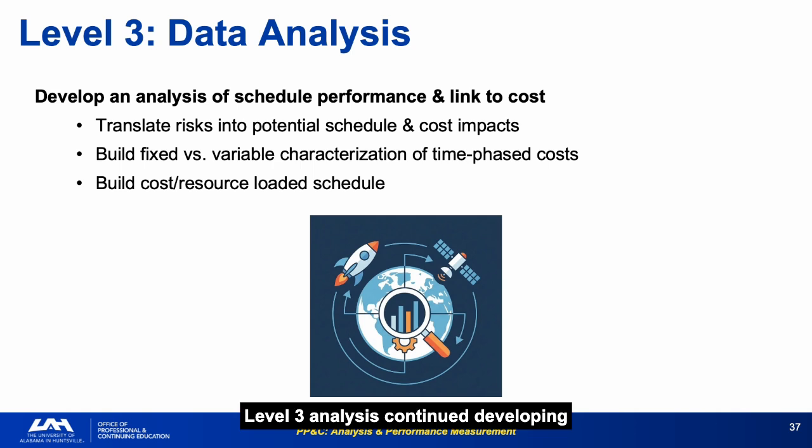Level 3 analysis continued, developing schedule performance analysis, translating risks into potential cost and schedule impacts, building fixed versus variable cost characterizations. Translating risks into cost impacts is where QRA concepts begin. This is not a separate activity from analysis. It is part of the same integrated picture.